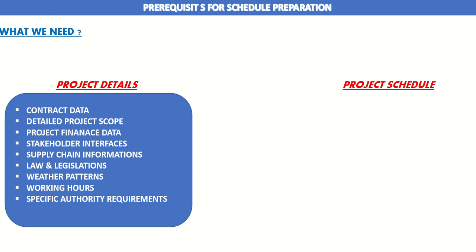So if you run through your contract documents, your tender documents, your BOQs, your drawings, and everything, you can clearly summarize your data, what you need, and then slowly you can jump another step and start thinking towards Primavera and creating the main skeleton, your breakdown structure.